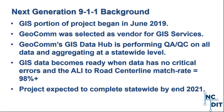Geocom's GIS Data Hub is performing QA/QC on all the required data layers for the Next Gen 9-1-1 project, and it also aggregates these data layers into statewide datasets. GIS data becomes I3-ready when there are no critical errors found within the QA/QC checks, the address-to-road centerline match rate is at 98% or above, and all the required layers have been uploaded into the system. The project is expected to complete statewide onboarding by the end of 2021.